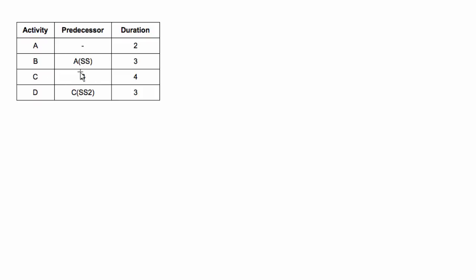There's a regular finish to start relationship here, nothing fancy there. And then D has a start-start relationship where it depends on C and there's a lag of two days.